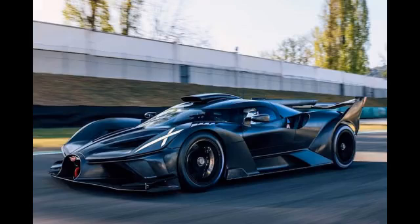While not achieving the same level of customization as a carbon fiber body, a pre-built fiberglass body offers a quicker turnaround time and potentially lower upfront cost. Selecting: LJRC researches pre-built fiberglass car bodies from various suppliers, comparing specifications, weight, targeting at least a 5% reduction from 2,200 pounds, equals a minimum weight of 2,090 pounds, and aerodynamic design features proven to be effective on high-speed circuits.